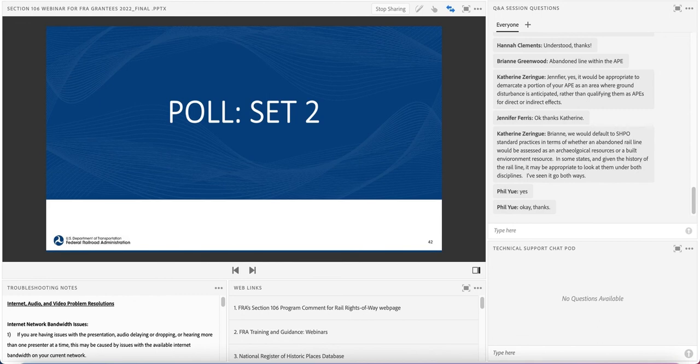Thank you. Again, lots of great answers. I think the first question, everybody got that right. But the question about the government-to-government consultation, the reason why that was false is because while project sponsors and grantees can assist with preparing information that's necessary for those consultations, FRA as the federal government is responsible for conducting government-to-government consultations with federally recognized tribes.